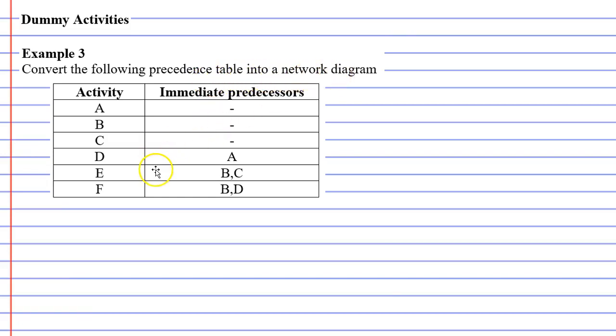So first of all, I just want to have a look and see if I'm going to get any dummy activities. And if I focus on activities E and F, I can see that both of these have a common immediate predecessor of B. They also have immediate predecessors that they do not share. They do not share activities C and D as immediate predecessors. Because of this, we know that we're going to have at least one dummy activity for this example.